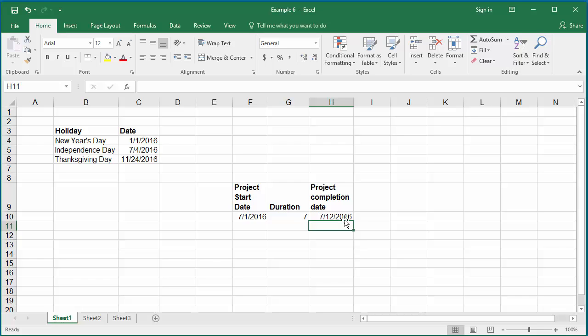The holidays can be defined as a range in the worksheet, and that range can be used to exclude the holidays in the WORKDAY function. The worksheet has holidays defined in cells C4 to C6.